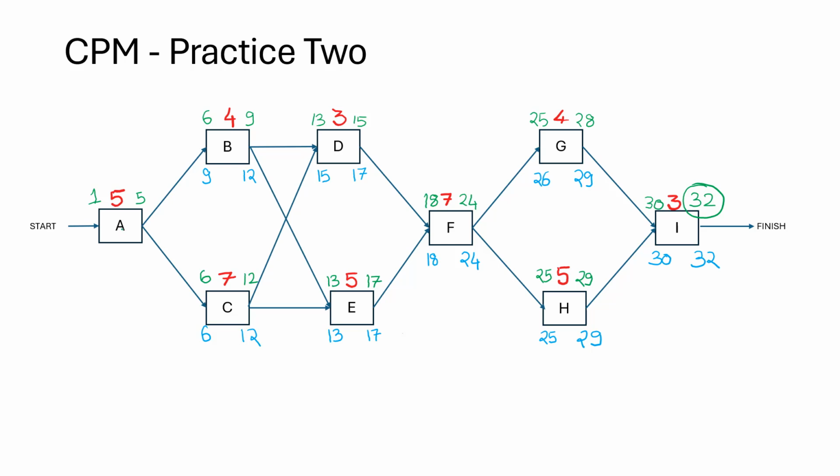Now activity A is going to be dependent on 6 and 9. We take the lower number 6, decrement 1. So we are back here at 5. 5 minus 5 is 0 and plus 1, we return back to day 1. So I'm going to circle this. This just shows that our forward and backward pass have been pretty much accurate.